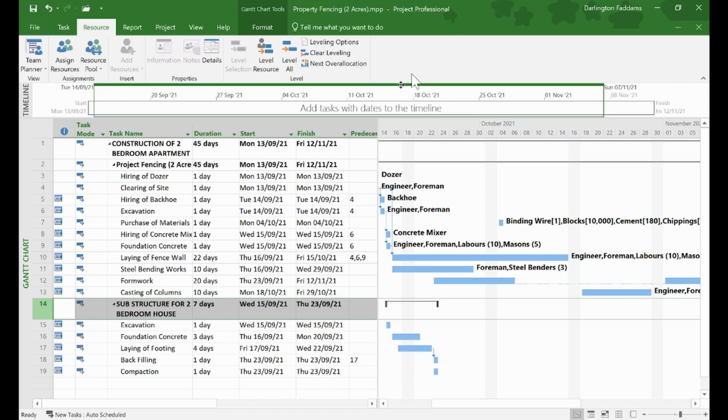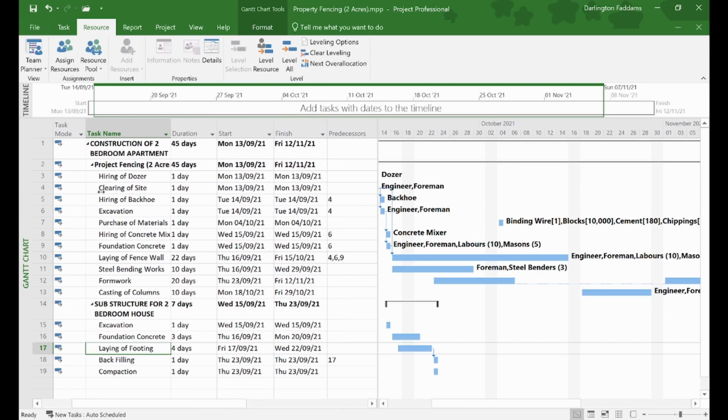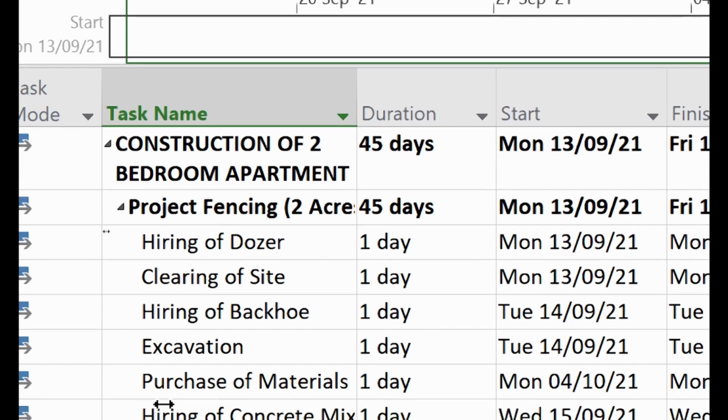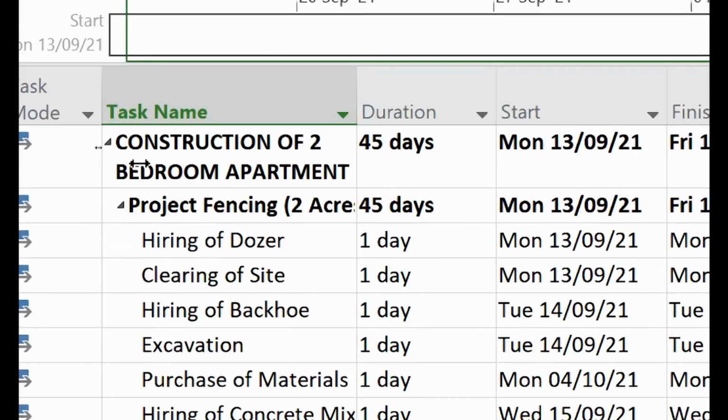All right. I just wanted to tell you that you can add other projects that are within the same project. So what we did is just one phase of the entire project. So usually this is what happens. It's good to group all those things so that you will know what each phase will cost. Then when we finish the overall cost too, you can create a summary at the top like what we did up here. This is very important. If you have multiple phases, then you need it.